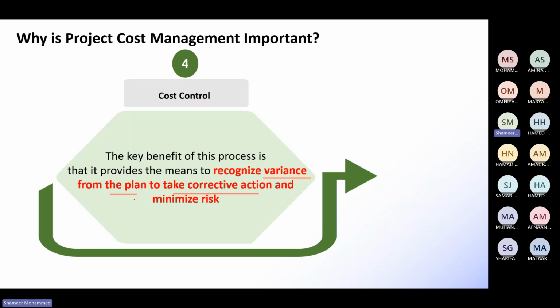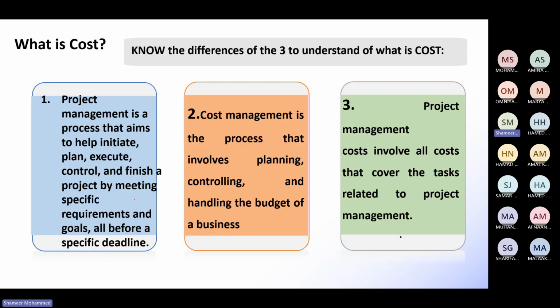If you estimate it wrong, then finally you will be in loss because of your wrong calculations. For example, to design the Sims application, you may need 6 team members, but you wrongly calculated only 2 members. Then 2 members means you will be heavily loaded. The work will be too high. With pressure, you may not complete the Sims application project in 6 months. So the wrong calculation will bring loss to your project. You have to calculate it properly and assign that budget properly.